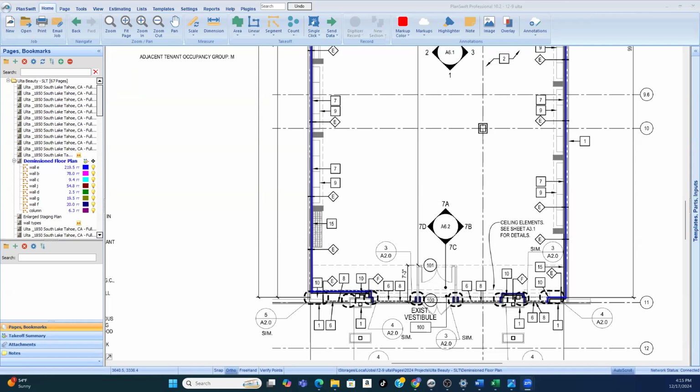And when it comes to estimating and you're a GC or you have to present a whole building's worth of estimate, you have to do the cost for the whole building. That's something totally different, where each one of those would be broken down separately. We'd have an estimate for the framing and the drywall, an estimate for the insulation, and a separate estimate for the roofing, because in terms of trades, those are totally different scopes of work. And we have to estimate them separately.